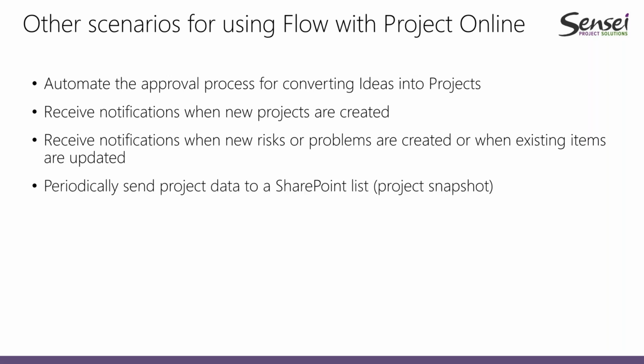For example, in a more advanced scenario, we can grab some project data and then store this information in a SharePoint list. So then we can take some snapshots. Say that, on a weekly basis, I would like to grab some data such as project name, start date, finish date, cost, work, and percent complete, for example. I would like to grab this data weekly for all projects, store this in a SharePoint list, and then in the next week we do the same thing, and then in the next week we do the same thing. So we have a snapshot. We can see how the project is progressing over the weeks. This is also something that we can do when using Flow. It's a more advanced scenario, but we can do this for sure.